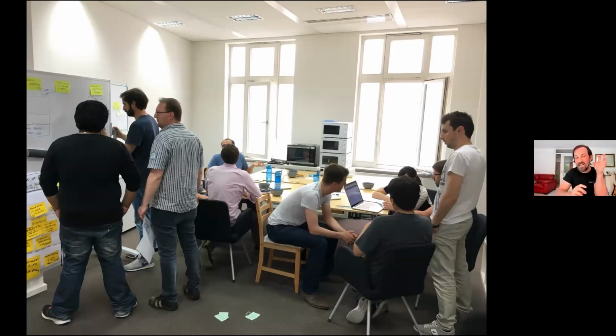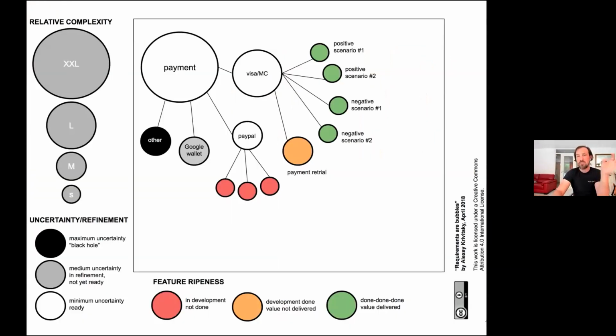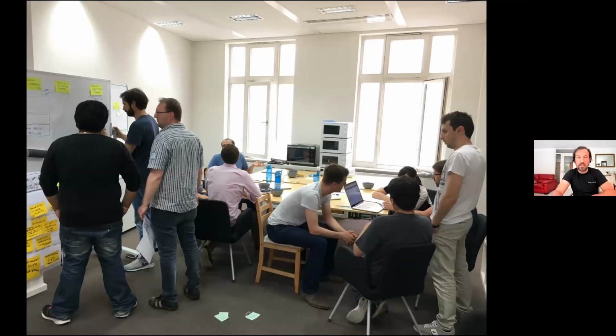If you do splitting in JIRA or in a tool which has the format, then typically you open up a ticket, you clone the ticket, right? And then you try to extract some item from the previous ticket into this one, but maybe you got the wrong splitting method. Or after you clone it several times, you don't know what's left, what's still unsplit. So I really recommend you first do it visually. And then if you want, you can move it to a digital form, which works much better.